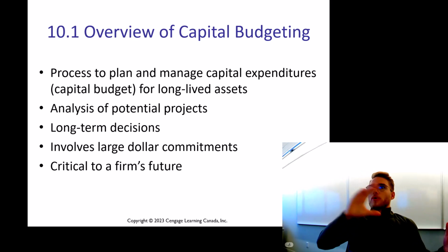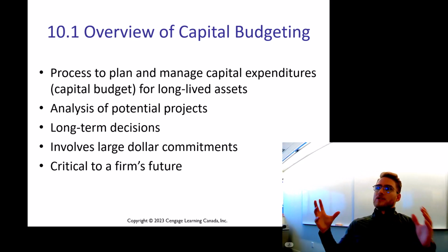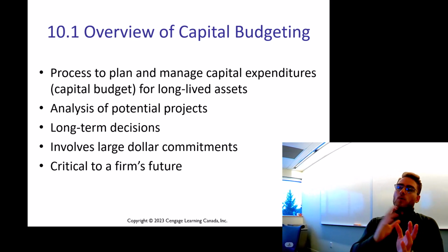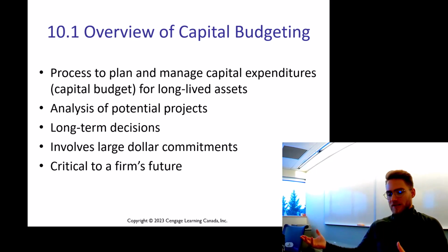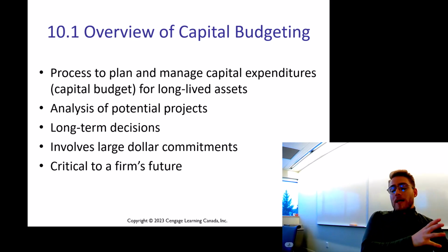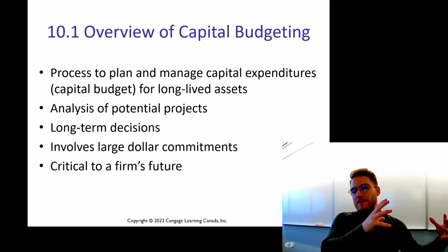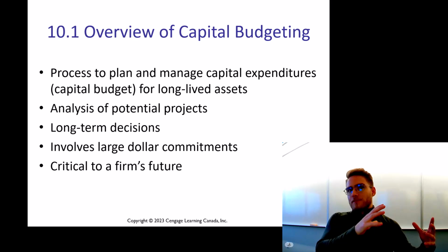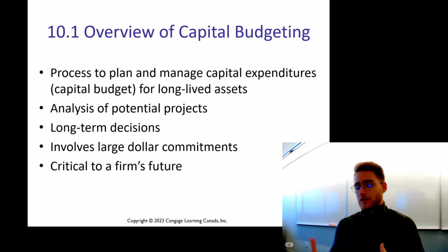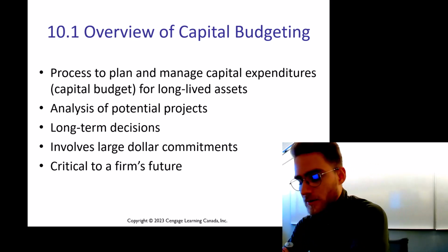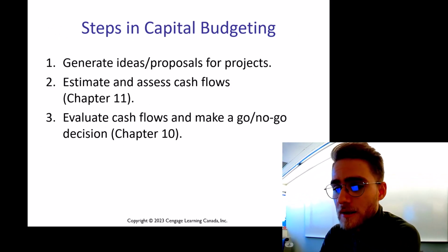But you have to go through and do this analysis and then determine, okay, based on the analyses, which projects have the best returns, the best future prospects, but also what's the cost? And then, with all the best projects included, how many of these projects can we do based on the dollars that we have available, right? So it's a lot more than just picking what's necessarily the best project. You also have to consider there are dollar constraints and you can't invest in every single profitable project.